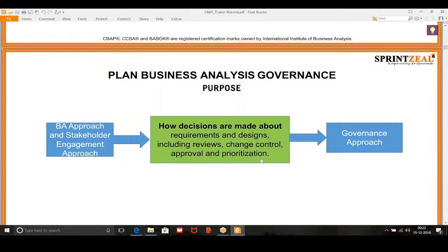And we have to highlight these things in the governance plan, because this sometimes happens with multi-year projects. If you are working on a project of 2 to 3 years, you never know how compliance is going to move. Compliance requirements change every year, right? And sometimes they are not very clear. So you are almost close to the deadline by when you have to be compliant, and the requirements are not clear. But once they become clear, the resources are already aligned with other projects. So you need to have a plan for how the requirements will be deprioritized, how the decisions will be made, and what technique you will use. Will you use the MoSCoW technique, or a high, medium, low complexity technique, or how do you want to go about it?